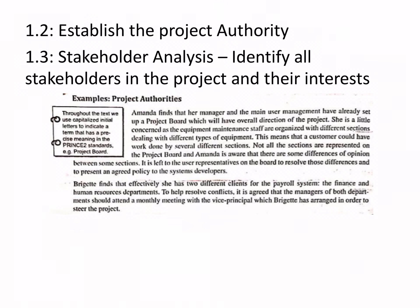Step 1.2: establish a project authority — identify who is going to be authorized, who will be the project team leader, what management levels will be in place. Project authority ensures that all objectives are unanimously being achieved. This is a preliminary aspect of any project. Step 1.3: identify stakeholders and perform stakeholder analysis — identify all people who will be affected by or have some interest in the project.